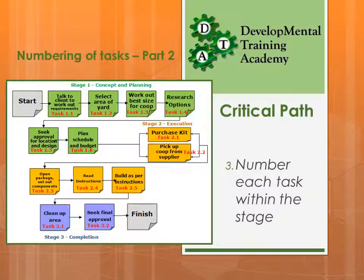The second part of numbering tasks is allocating numbers to each individual task. The first task — talk to our client and work out the requirements — is task 1.1: stage 1, task 1 within stage 1. The second, select the area of the yard, is task 1.2. Work out the best size for the coop is task 1.3, and so on. Moving into the yellow section, it becomes stage 2, task 1; stage 2, task 2; stage 2, task 3, and so on throughout.